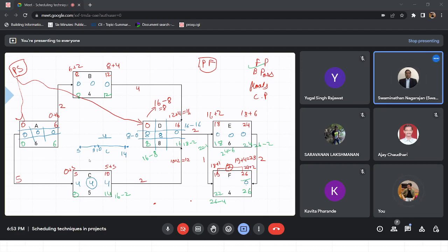Yeah, that's what it says. I mean, you can use part by part also, like you use part of it at the start, part of it at the end, because this is interruptible. So the total is limited to 4 only. You have to distribute the way you want. Yeah.